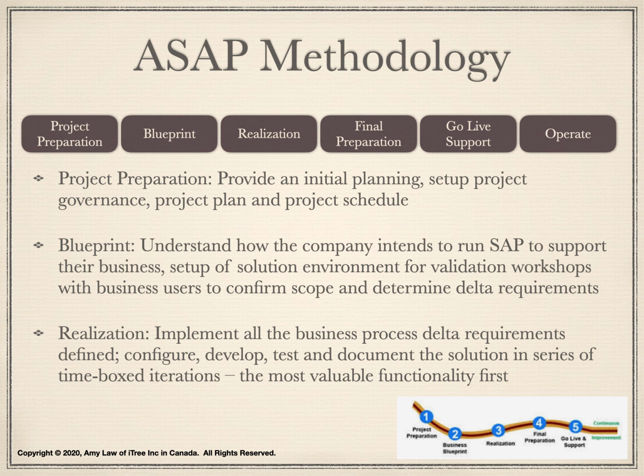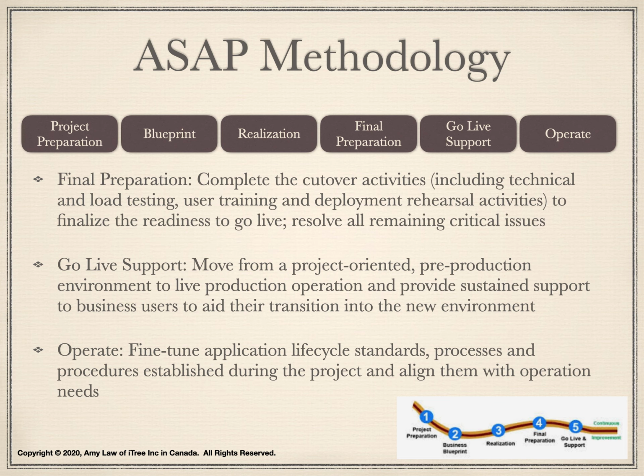The team configures, develops, tests, and documents the solution in a series of time-boxed iterations. The final preparation phase is to complete the cutover activities to finalize the readiness to go live. The cutover activities include technical and load testing, user training, and deployment rehearsal activities. This phase aims to resolve all remaining critical issues.